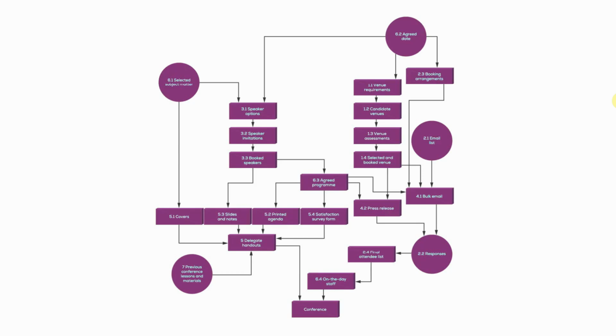Because if we now put a time and cost for each of these products on the product flow diagram, you'll be able to see exactly how much the total cost will be, and you'll be able to see, because many of the activities will ultimately be running in parallel with each other, we'll be able to come up with some type of schedule to show how long the project is going to take.